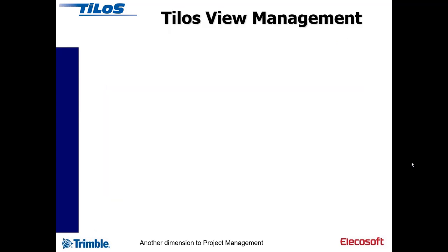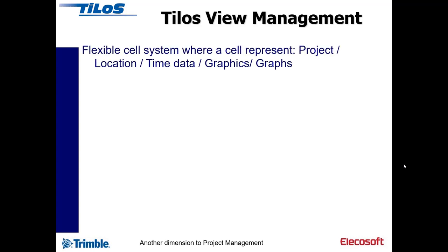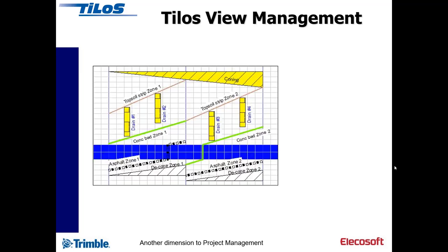So there are two concepts in TILOS I want to quickly talk about. One is about views. So views are familiar to Power Project users and to Microsoft Project users, and to P6 it would be most similar to layouts. And this is where we're creating a graphic on screen, and that's what we're going to print and work on screen. And we're creating a view made up of cells, and each cell has got a particular sort of data. So I create an initial cell of making a new view, and in that cell, I say